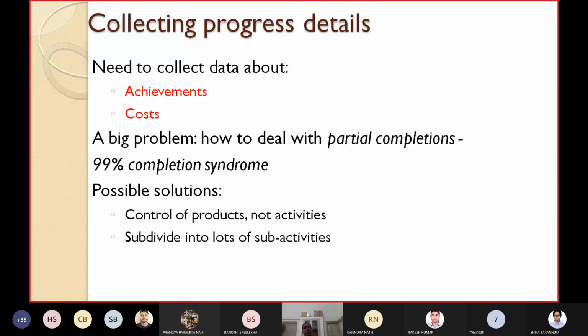Where there is a series of products, partial completion of activity is easier to estimate. For example, counting the number of record specifications or screen layouts produced can provide a reasonable measure of progress. You want to know the progress of your project.